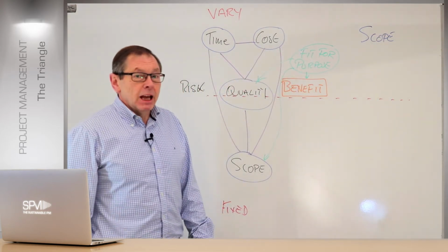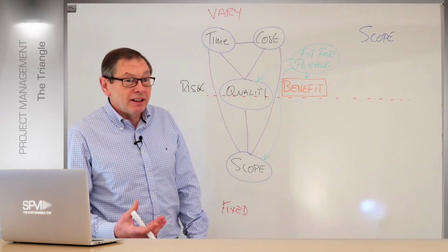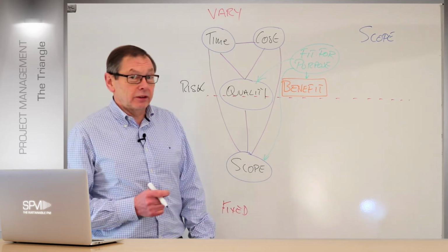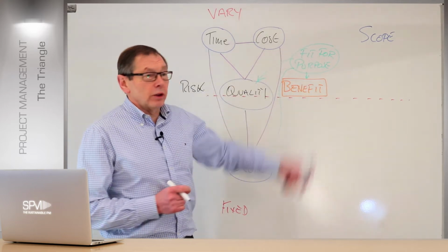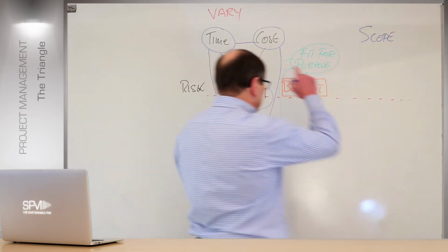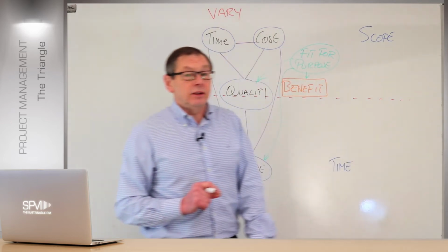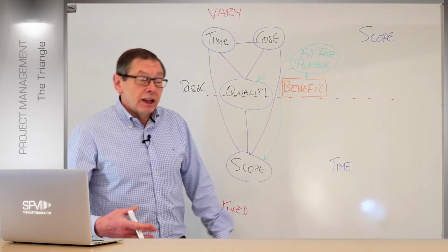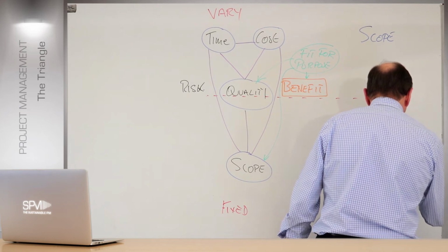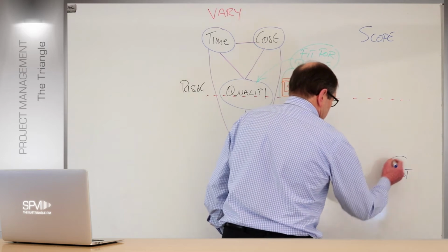Right. Now the thing is, normally we tend to use time and cost as a contingency. Right? I need more time and/or costs to help me make sure I deliver this. But I can't have them all at the top end. Something's got to actually lock in. And quite often we say time is of the essence, as we said there. Time needs to be fixed in many cases. And realistically, if that's fixed, then we ought to be saying, well, okay, we need to lock in costs to all intents and purposes. Right? So here we have these two here.